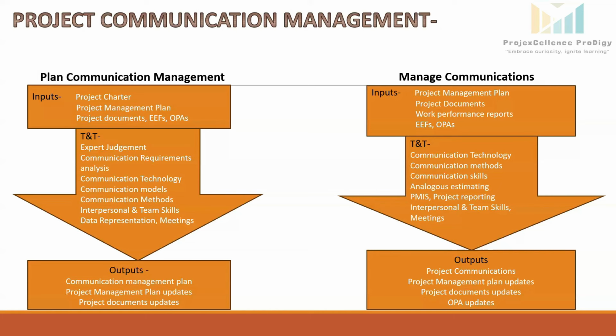Communication methods. Effective communication ensures smooth coordination among stakeholders. Like interactive communication, it is real-time two-way communication, like meetings, phone calls, instant messaging, and video conferencing, and daily team briefings to coordinate the tasks. Push communication: information sent directly to stakeholders through emails, reports, memos, and newsletters without guaranteeing receipt or understanding, like sending a weekly progress report to the stakeholders.